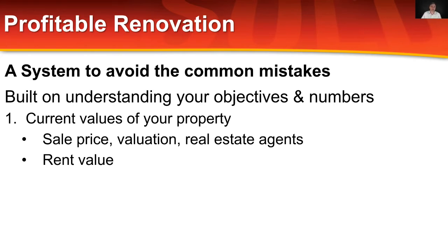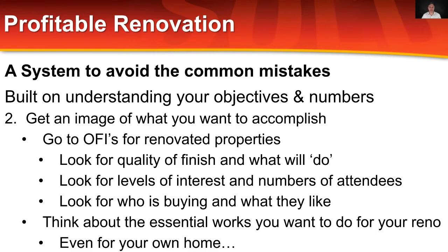We're not looking for rocket science, and I'm definitely not suggesting that you pay for a full-blown valuation. I'm suggesting that through a couple of real estate agents, through an understanding of what else is happening in the suburb or neighbouring houses, or recent sales of other properties similar to yours, you'll get an idea of value. You'd also obviously then want to get an understanding of rent value. So if you've just bought it and you're not clear on the rent value, then you'd get some advice on that too. But on the basis of that, you have a foundation on which you can then go, I can build from this.